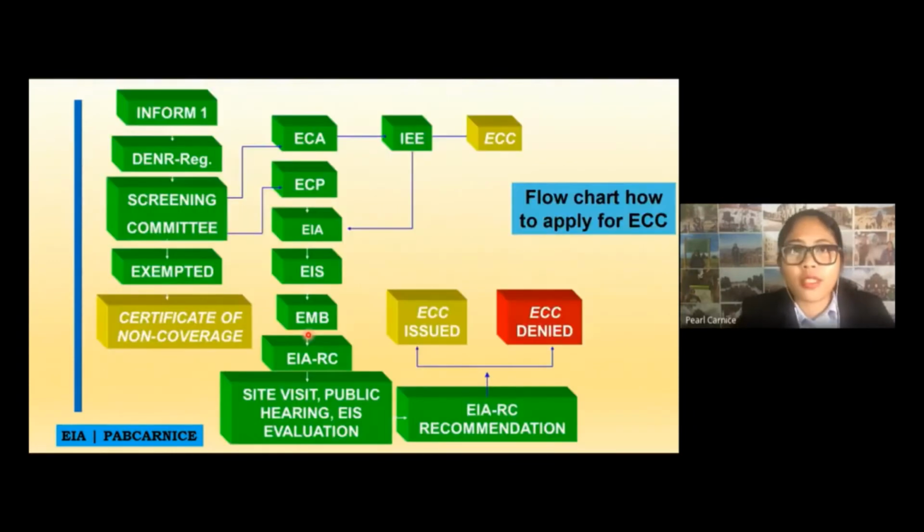This is the flow chart of the EIA process in the Philippines. Of course, we have to inform the DENR regulatory board as to what kind of project we are doing. We have the screening committee, which will check if it's under environmental critical projects or environmental critical areas. If it is under environmental critical area, you will need an IEE, and you will have to secure an ECC.